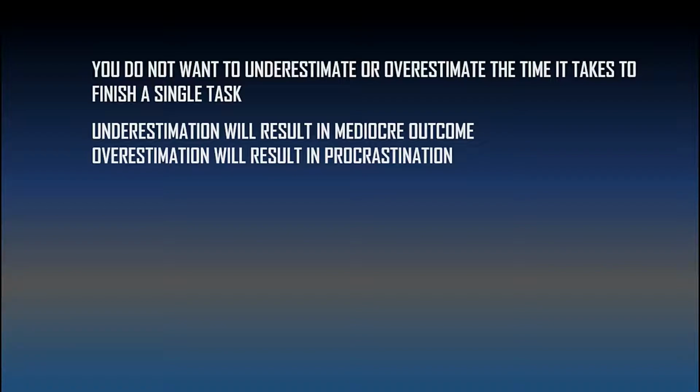Another thing about coming up with the timeline is that the employees working on that project will deliberately complete the task at the last moment in the timeline, even if they are capable of finishing the task much earlier. They will procrastinate, thinking that they are not going to be blamed for it if they are able to complete the task in a specific time.